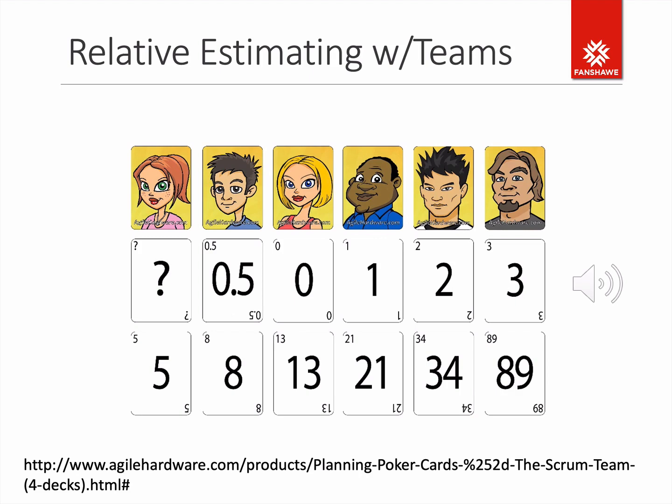I think once we've had an opportunity to talk about it and people have a better understanding of the rationale, you might see some changes in the voting. So what we do is we try and vote again to try and find consensus. So we go back through the process. Everybody puts the cards in their hands again. They think about all the comments and the questions that were asked, and they try and vote again in hopes that we'll gravitate towards a common estimate.